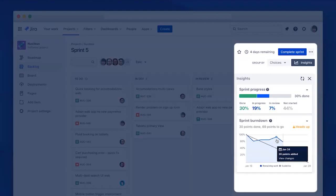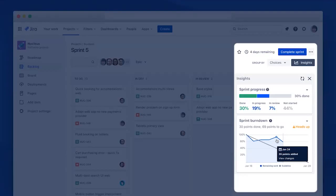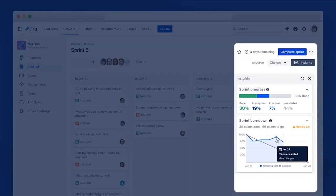Opening both cards, you see that sprint burndown is suggesting some serious scope creep. This is a great point to discuss with your team what's happening here. And you realize that some of the work weren't well defined ahead of the sprint so that the team and the PMs had to break it down further and add more stories in the middle of the sprint. And to make things worse, some of the team members had been taking sick leaves. So this time the team wasn't making as fast progress as they would usually. This isn't an ideal scenario, but it's great that you're reviewing this data.